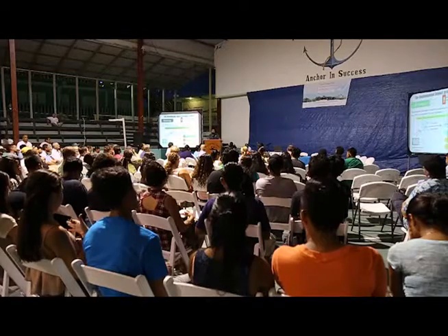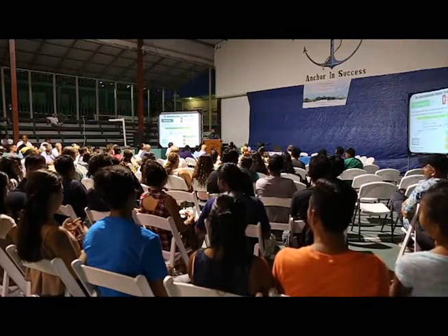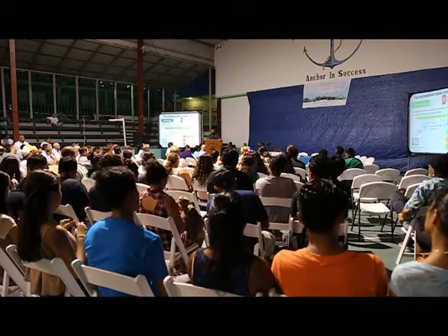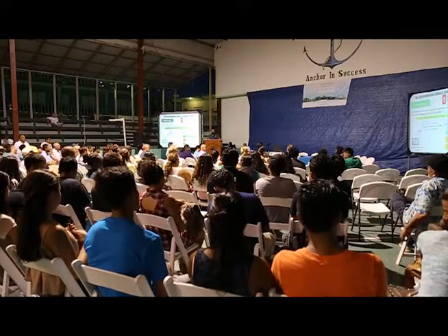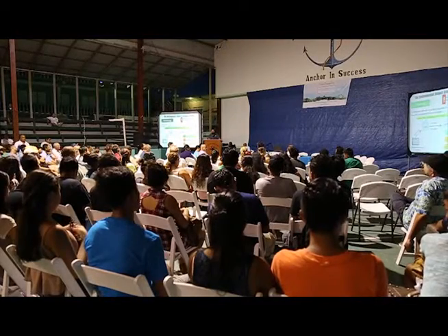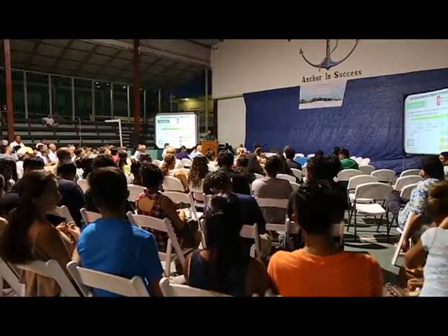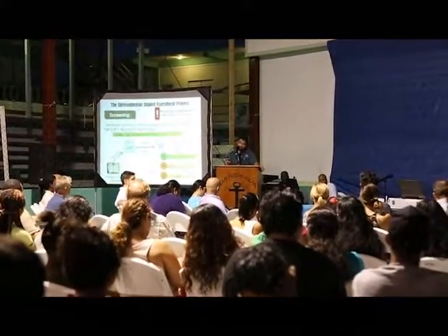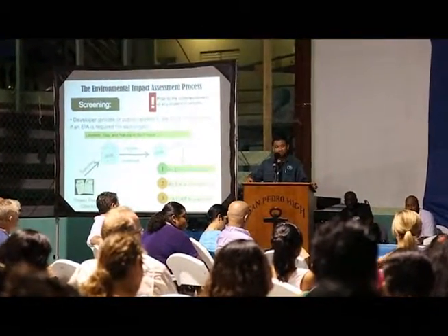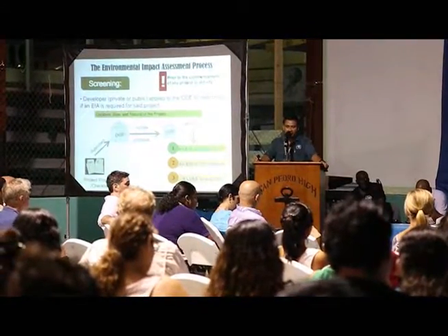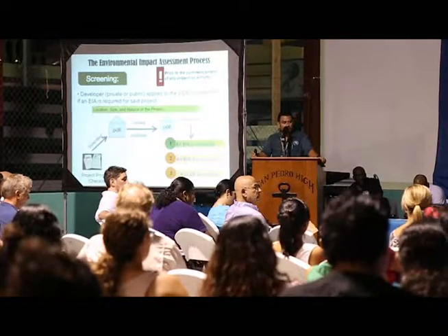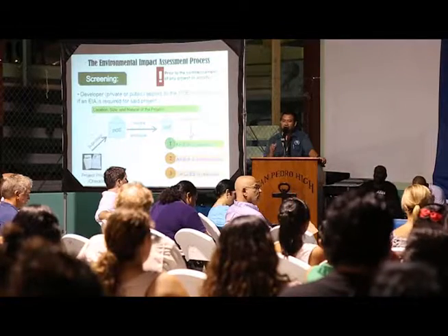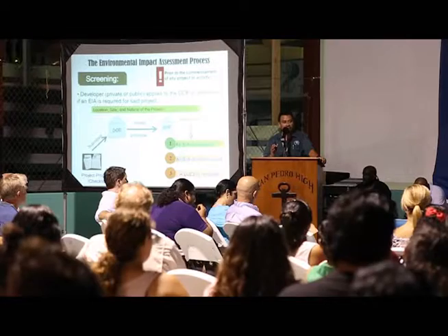The environmental impact assessment process, which is guided, as I mentioned earlier, by the environmental impact assessment regulations, has two schedules. It has a Schedule 1 and a Schedule 2, and all Schedule 1 activities, it's mandatory that they do environmental impact assessments. Schedule 1 are mandatory environmental impact assessments, and Schedule 2 may or may not require an environmental impact assessment or a limited level environmental study. Now, this limited level environmental study is something relatively new. It was implemented in the amendment of this legislation, the EIA regulations, in 2007. Its difference with the EIA is in regards to the scope of work. The scope is determined by the terms of reference. So that is a major difference that we need to understand.